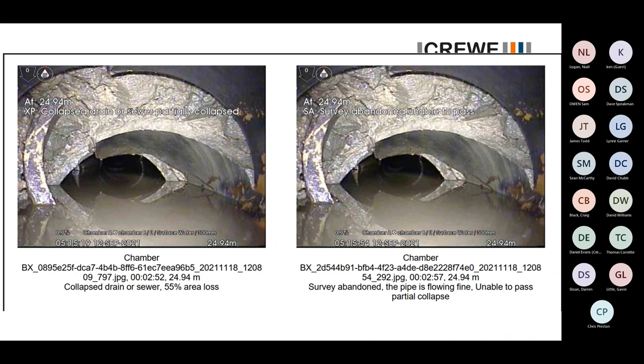Now, that's fine, but we had a program to meet. So before we got to be able to do that, that meant we now needed to think about the fact that we were building a functioning drainage system upstream. What happens during the winter? Luckily, we've not had a very wet winter, but if we'd had a very wet winter, that's not functioning at full capacity anymore. The new drainage system is now relying on the end of the system working as it's meant to, but it isn't because we haven't fixed it yet.